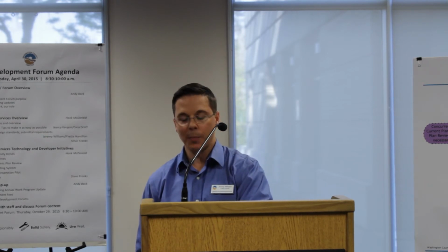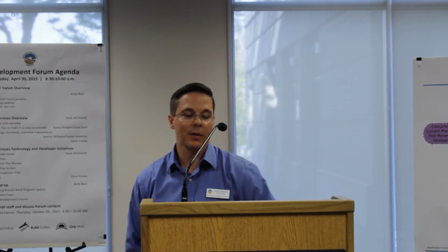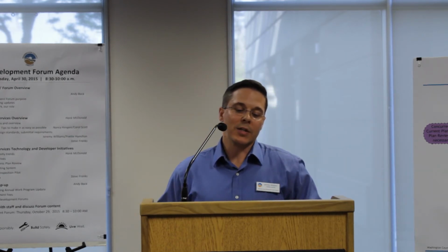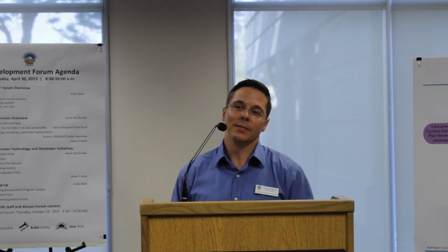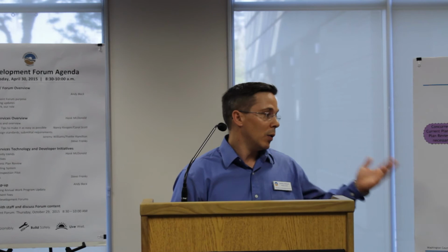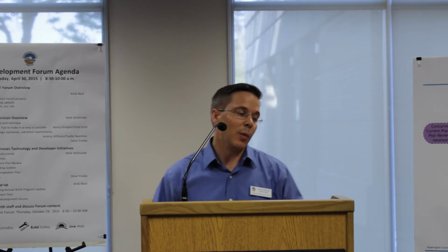Some of the big typical issues that slow us down a little bit: plans and calculations not stamped or signed. We just can't even start the process really until we get a package that we know has been engineered when it needs to be for code.